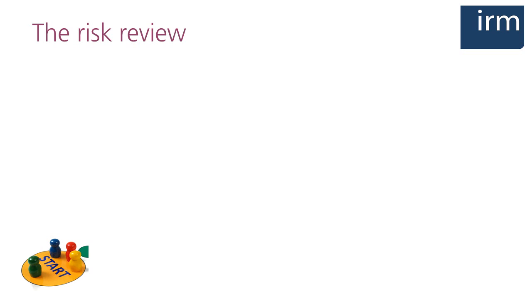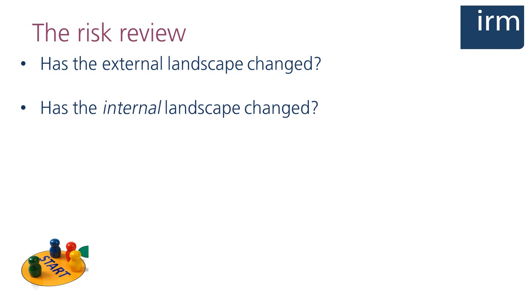So what should you look at when you're conducting your risk review? We touched on it when we were talking about tolerating risks, but risks do change. Sometimes your improved knowledge of a situation means a risk appears more or less important. Or it could be that internal changes such as a new strategy or a new CEO or external changes will impact on the risk. Look at each of your risks and consider whether there have been any such changes that might need you to re-evaluate the risk score.